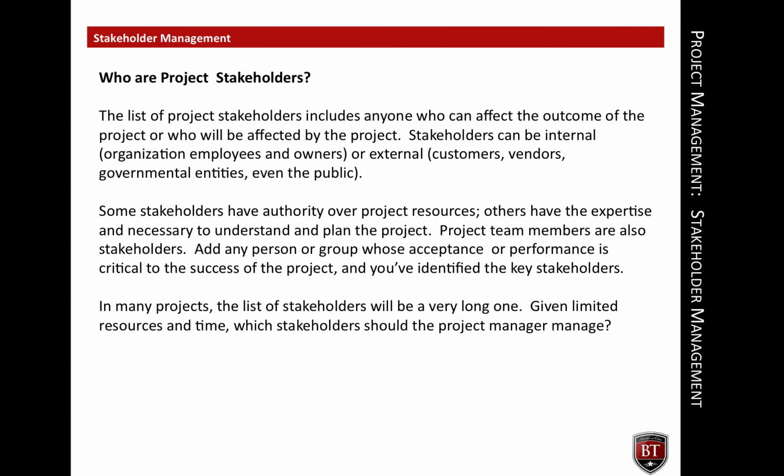Who are project stakeholders? The list of project stakeholders includes anyone who can affect the outcome of the project or anyone who will be affected by the project. Stakeholders can be internal, any employee or owner of the organization, or external: customers, vendors, governmental entities. Even the public can be a stakeholder in a project.